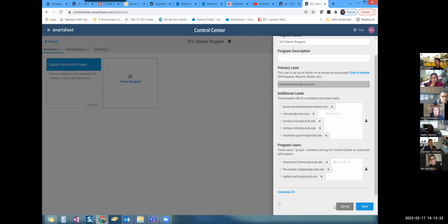So we covered this in our previous recordings twice. It starts in the intake. The intake is going to be what projects you can then create in Control Center. And the reason being is we can set up auto provisioning, where as soon as I hit approve in the intake sheet, it creates it. That's completely fine. Yeah, I think that's what we want. They don't do that right now, and it's because if you want to add additional sharing, or if you want to not provision a project immediately, even though it's been approved, that's why we have people come in and create the project. But you can do auto provisioning, and I'm more than happy to set that up.